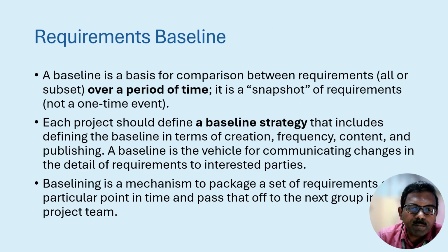Now there is something called a requirement baseline, and over a period there will be changes. But ultimately, as we saw in the pyramid, there will be some basic requirements we have to understand. So the baseline strategy includes defining the baseline in terms of creation, frequency, contents, and publishing. Baseline is a vehicle for communicating changes in the detail.